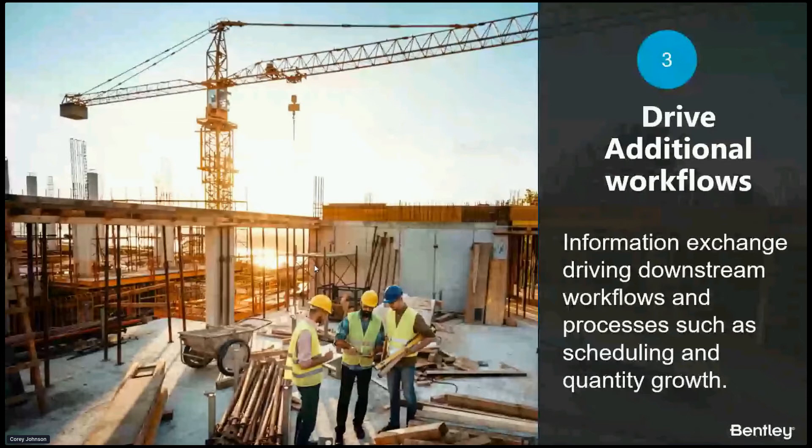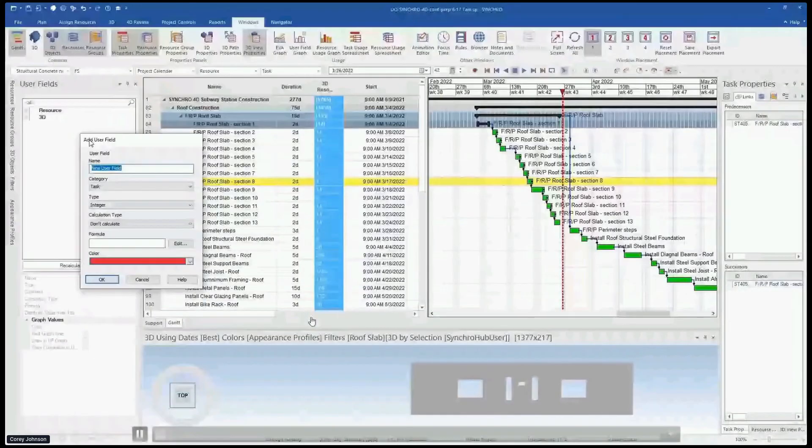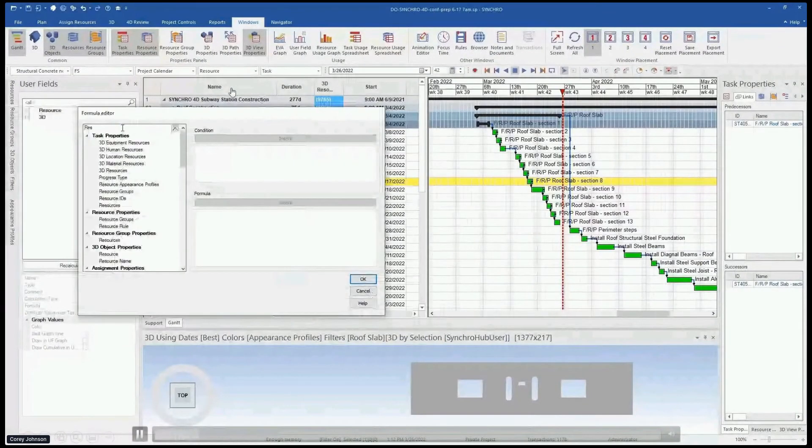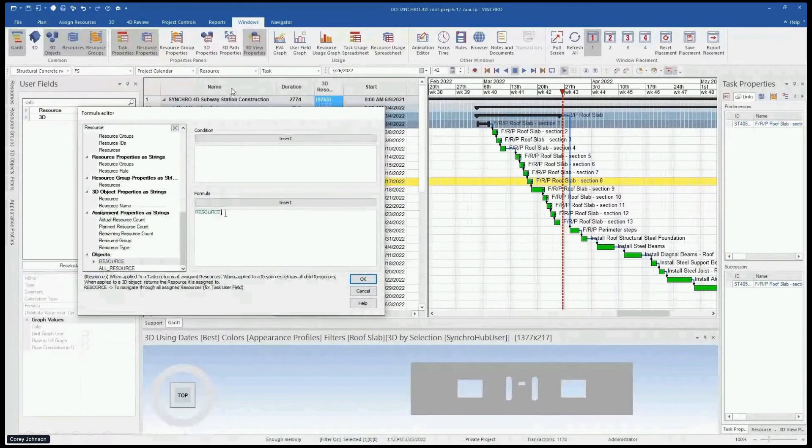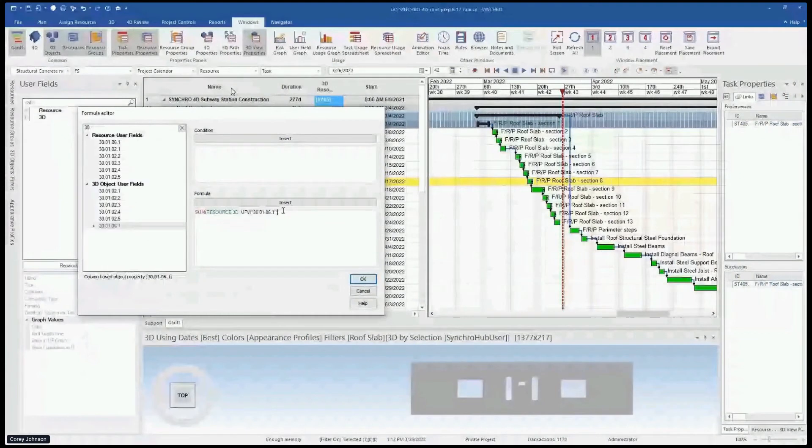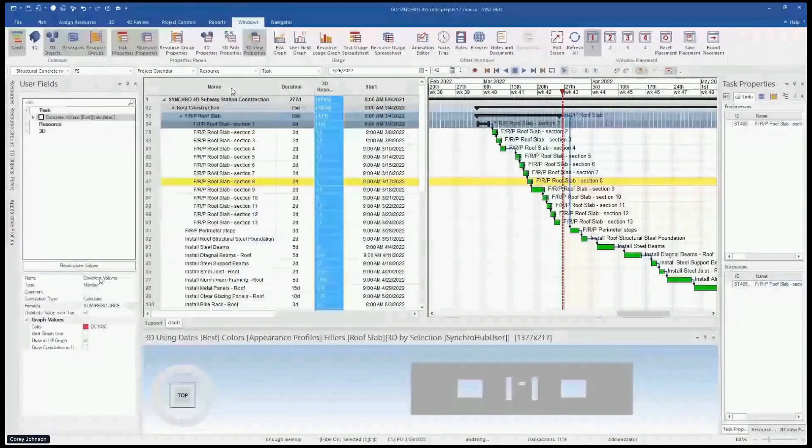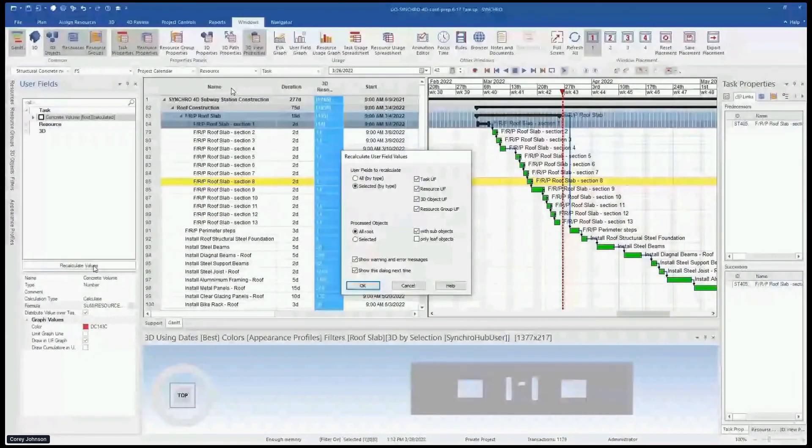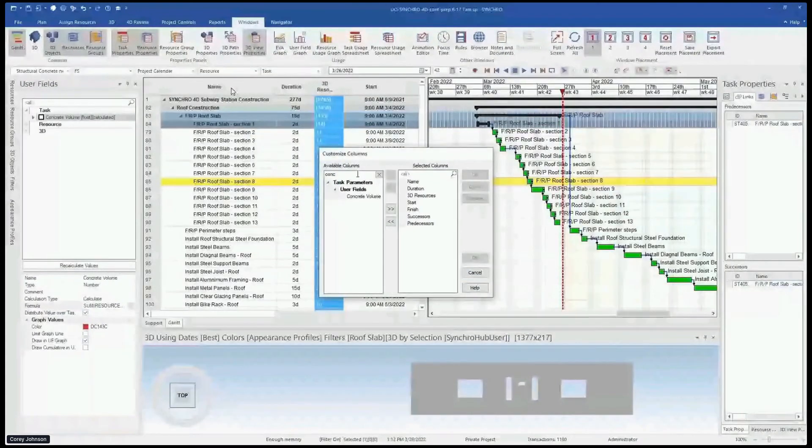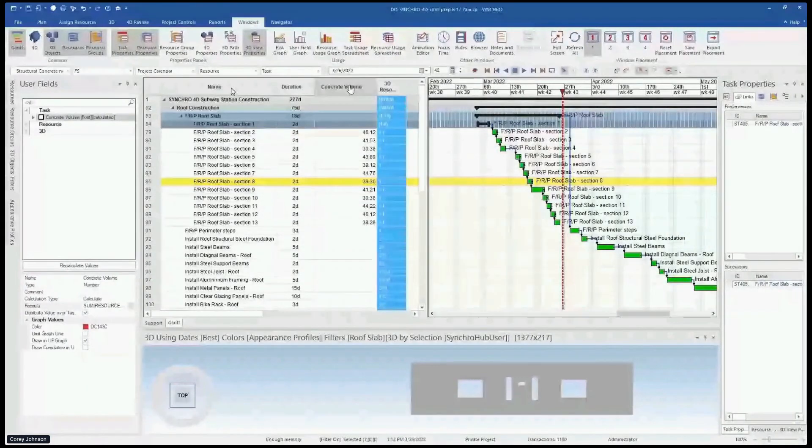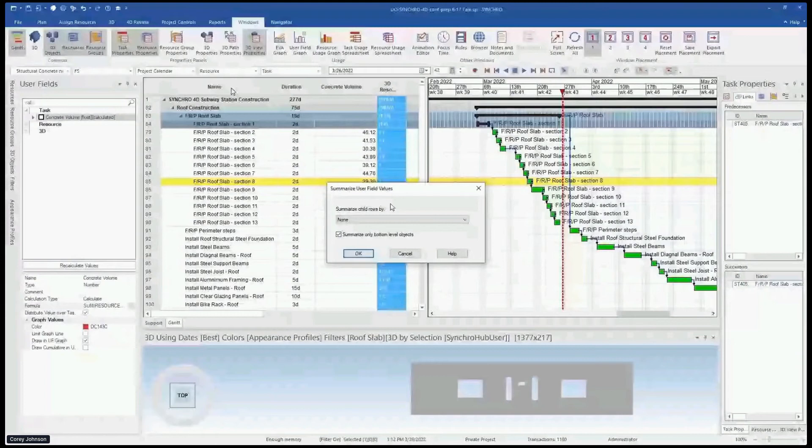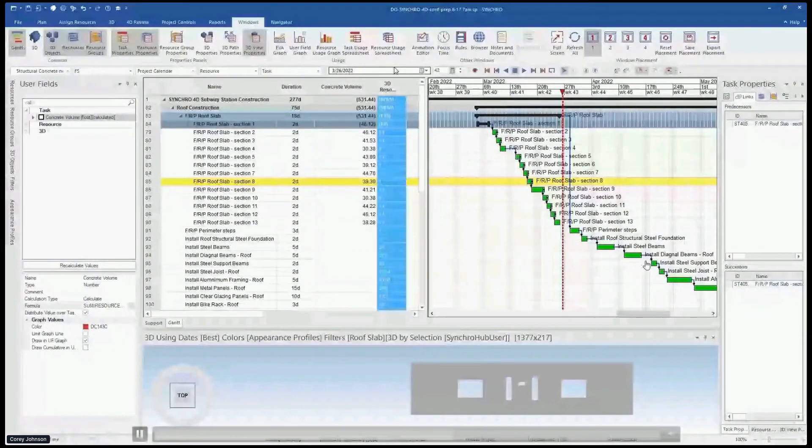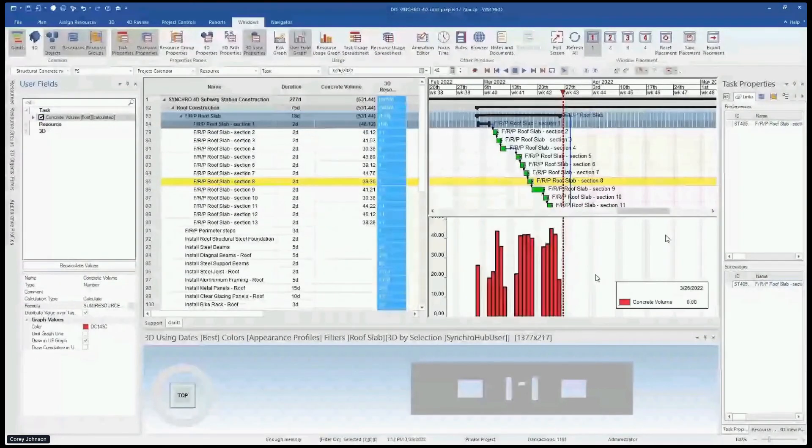Once you do this, you win that job. Now what can I do with that information that's assigned to that model? So I come in and notice there's our slab, and what we're doing here is we're saying, hey, read those properties off of that concrete slab - and remember it was a 30-01-06 - so read that. Let's put those quantities into our estimate or to our schedule. Show them to me. So watch this - we're going to add into this column and we're going to see the individual pieces and then the cumulative sum. Now this is important because we know the production rate, we know the quantities, it's going to drive the durations on our schedule.